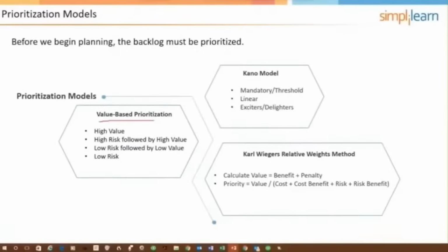So, we might have written this a little bit differently, but that's value-based prioritization, and this is primarily the product owner with maybe some input from the team, just simply deciding what he or she wants done most, listening to the team say, well, there's some greater risks with this user story than that. And so you'd probably want to persuade the product owner to take care of high risk stuff first, because that would have an impact on the future things that need to be done.